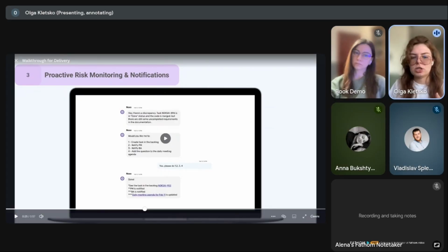We can just give instructions to Noxs and say, if more than 80% of time is spent but less than 60% of tickets are delivered, please report to me or notify someone from my managers' team. Or another example, if we spend more than 1,000 hours this month, notify me or someone else, or notify Alona, and Noxs will do it.